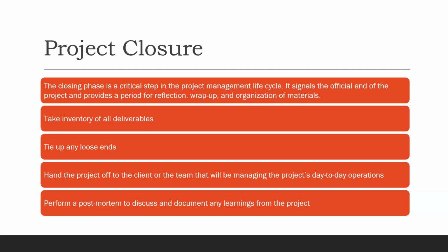And in some cases, it will be a sustainability strategy. We have funded you for community gardens, and what is the plan to sustain the project after the end of funding? So then you come up with your strategy. Remember, I mentioned earlier, training. People are trained to continue. Seats are provided. Those are what we call exit strategies. You bring in expertise to do the exit strategy for you. And then you invite all stakeholders around the table and you decide.